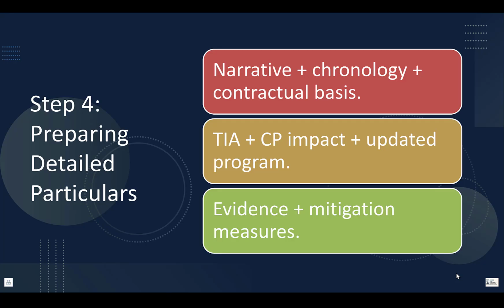Important to mention that the 84-day requirement did not exist in the same structured form under 1999 clause 20.1. The 2017 clause 20.2 is more procedural, consolidated, and maybe more enforceable. However, I'm saying this again in abstract terms based on the wording of the clauses, without implying legal enforceability outcomes. Those depend on governing law, tribunals, and so on.